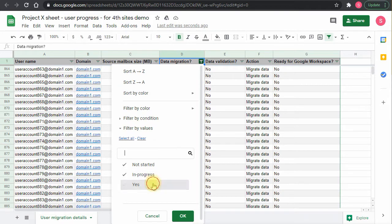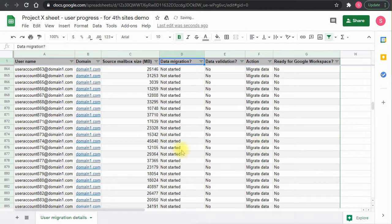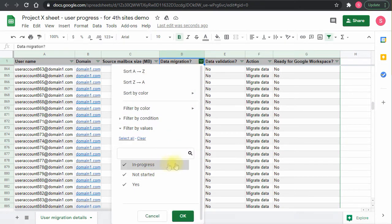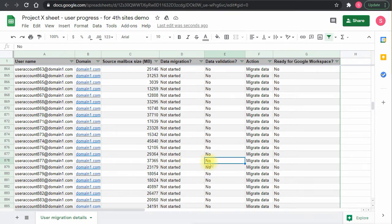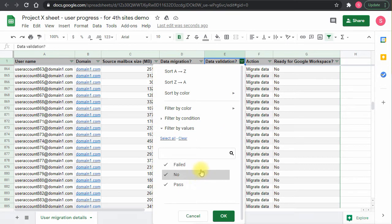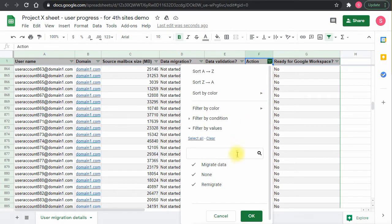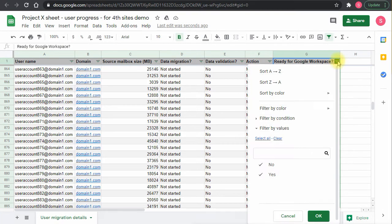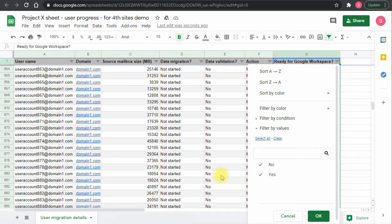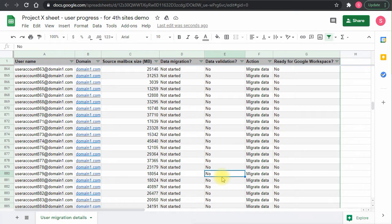As the project progresses, the data will change — status will move to 'in progress' or 'finished', data validation will change from 'no' to 'pass' or 'failed', and actions will say to migrate data, remigrate, or none. The last step marks the user as ready with 'yes' for the switch to Google Workspace, then they go into the change management process to train users.